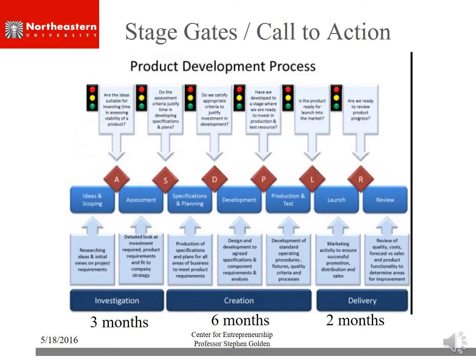The last document is the call to action document. This is really the Gantt chart done visually, and this just shows a series of stage gates. This needs to get done when this is completed. We do a review, we decide what we're going to do next. It helps you visually track a project. This needs to be in your BlueBook document so that we can see, in the 14 weeks that you worked here, what you expect to get done, and then what happens? Where would you go from there?